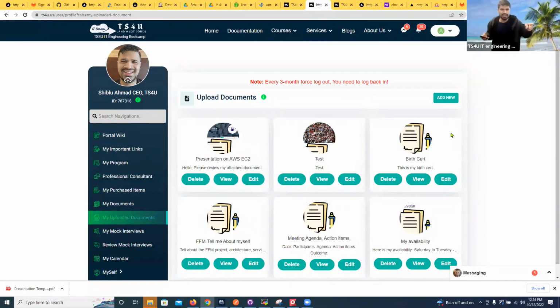it's not done. To the business, done means it is actually in the production, that the student can use. That's what done means to the business. If the user story is in the staging environment, that's not done. And a user story can have the commitment: not fully done, partially done, done. All is applicable based on the team commitment, team capacity.